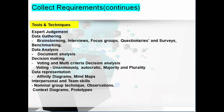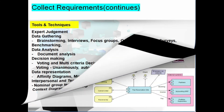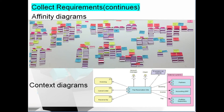Affinity diagrams are an important technique in which ideas generated from any requirements gathering technique are grouped by similarities; each group of requirements is then given a title. This sorting makes it easier to see additional areas of scope that have not been identified. Data items can also be organized by requirements categories: business requirements, stakeholder requirements, solution requirements, transition requirements, and project requirements.